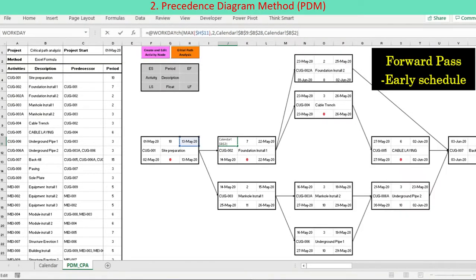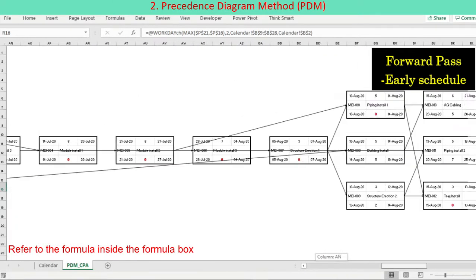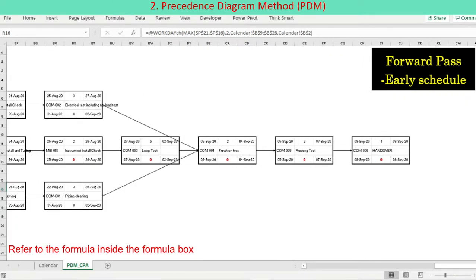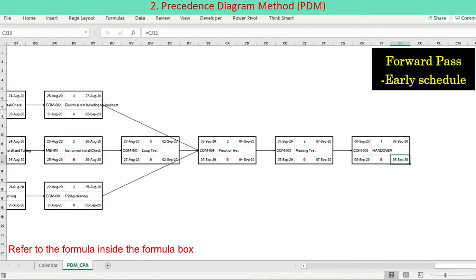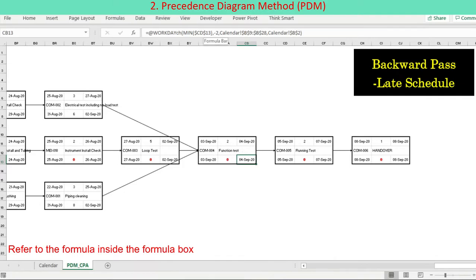This method enables early schedule calculation along a forward pass starting from the start activity, and also enables late schedule calculation along a backward pass from the last activity. This method gives an accurate and reliable outcome to identify critical activities and come up with a logical project schedule. Calculation is extremely simple but takes time since manual arithmetic operations are done activity by activity.